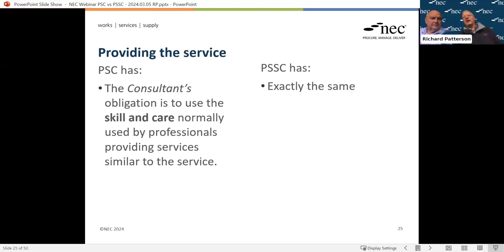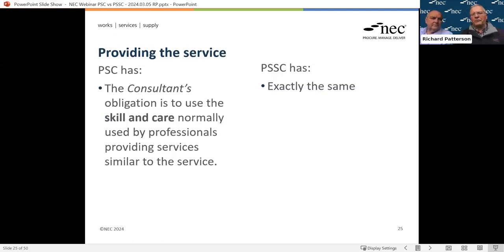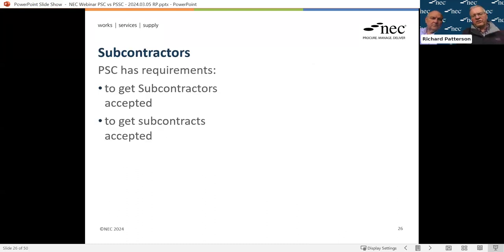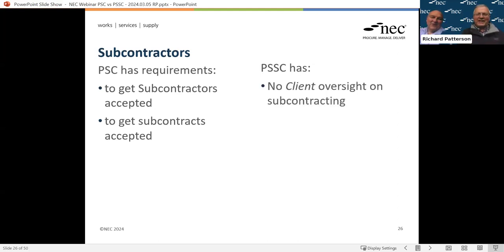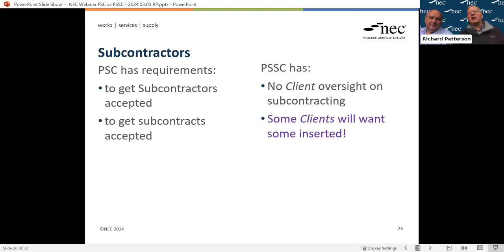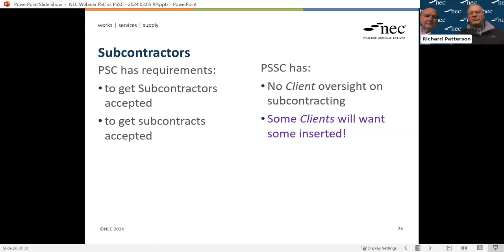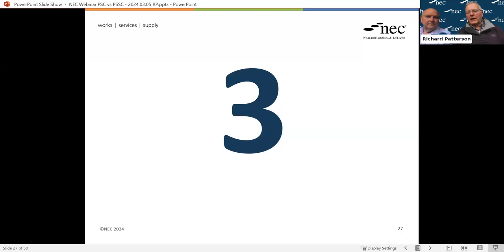Providing the service with due skill and care is exactly the same in both the PSC and the short contract. On subcontracting, the full PSC has proper requirements to get subcontractors accepted. The short contract has absolutely nothing - no client oversight on subcontracting whatsoever. Some clients will want oversight inserted - you could write it into the scope but probably need it as an additional condition. For those words, you'd simply take them from the professional services contract.